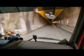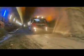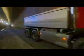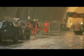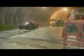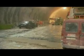The world's longest tunnel is also one of the world's biggest construction projects. The building of the gigantic Gotthard rail tunnel of 57 kilometers started as early as the end of the 1990s. The tunnel will open for rail traffic during 2017, all at a cost of some €8 billion. The tunnel will become an important link in connecting the rail networks of northern and southern Europe and the major ports of Rotterdam and Genoa.